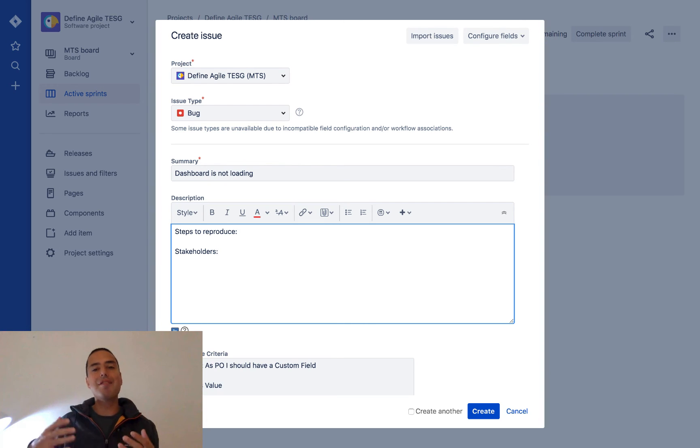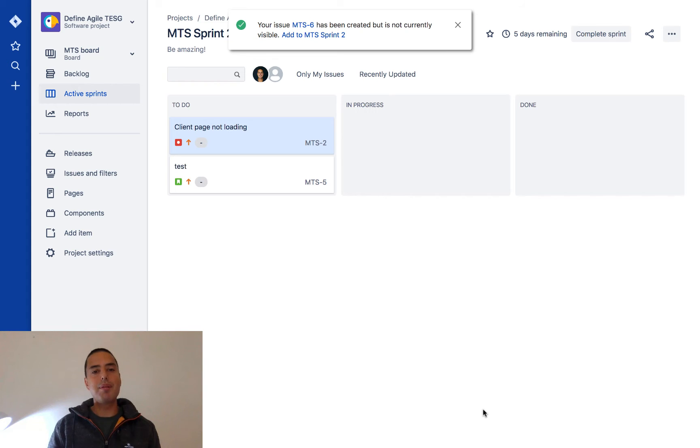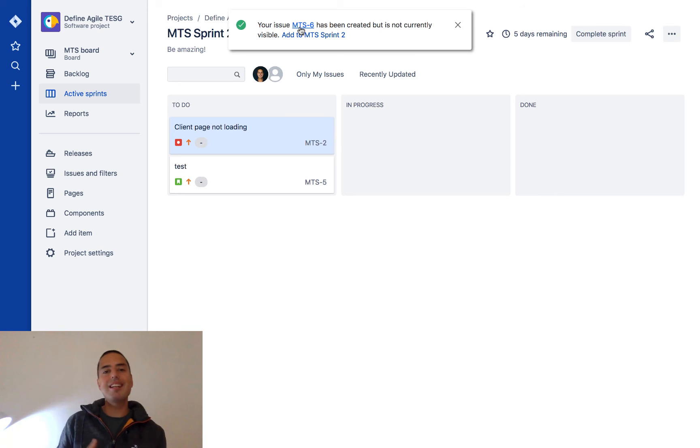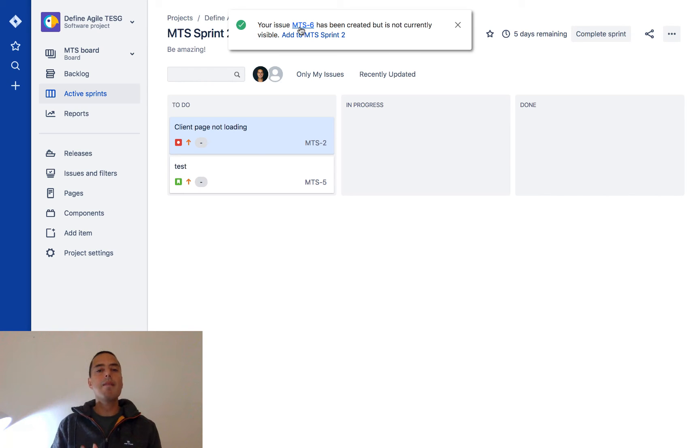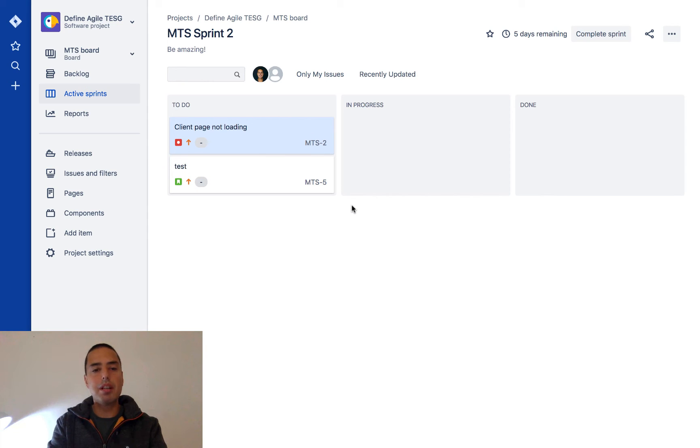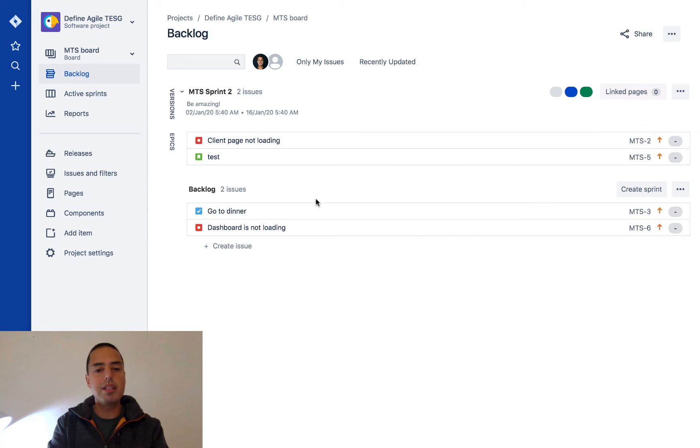Let's click create. We created it - it says your issue MTS-6, which is a unique number for your bug, has been created. It's not currently in this board because this is a scrum project and it's not part of a sprint, but if we go to backlog we'll see that 'dashboard is not loading' is there. Our bug exists in the backlog.